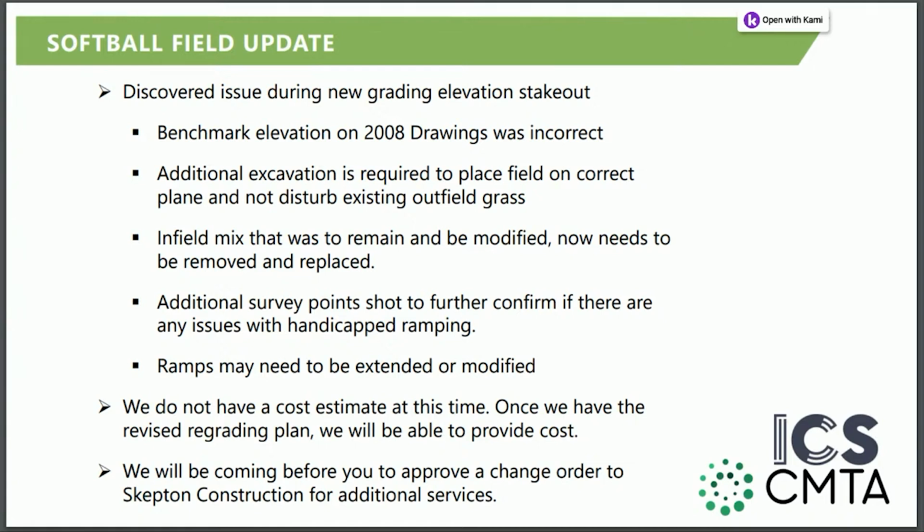Are there any questions as far as what's going on with the softball field? And the only thing, just to make sure, the contract, certainly I appreciate the conversations that we've had with our ICS team. As the contract is owned by the district, we would have a change order that would need to be approved and change the total dollars on the project, and then we would have to work out some of those details after the fact. That's correct. Yeah, the contract is between the school district and the contractor, so a change order would have to be issued, and then we could work that out after the fact. All right, I appreciate that.